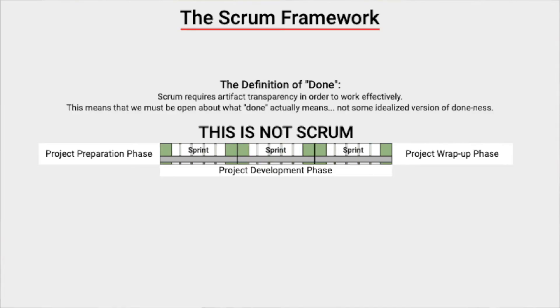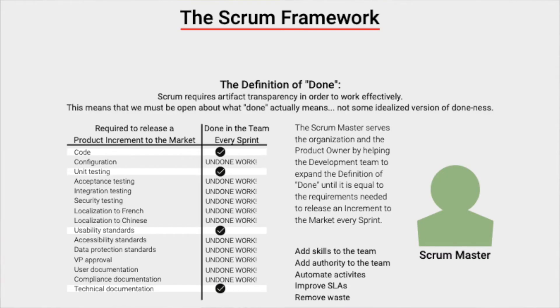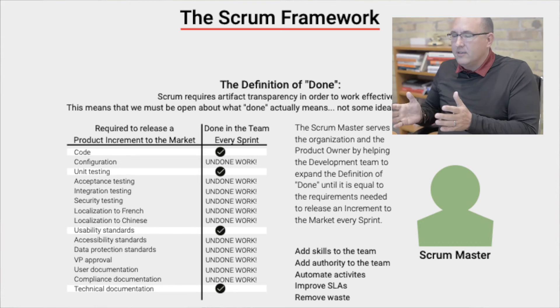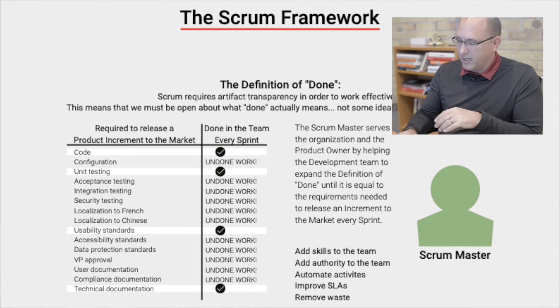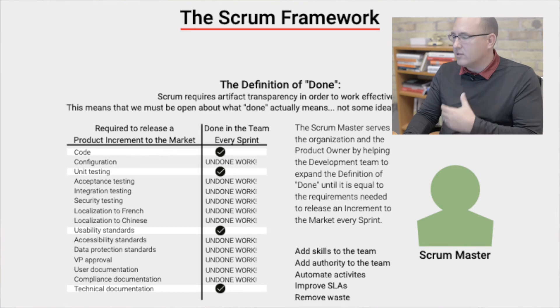Over time, we want to change this situation. The Scrum Master is responsible for helping the team expand the Definition of Done so that 'done' looks more like 'releasable' over time. That is organizational work — it involves skill sets and many aspects of improving how the team operates.